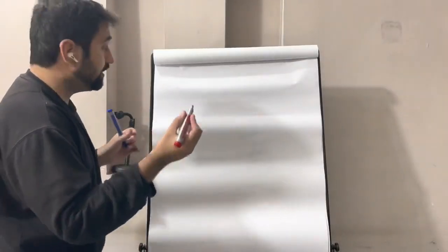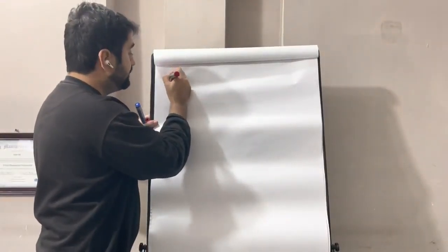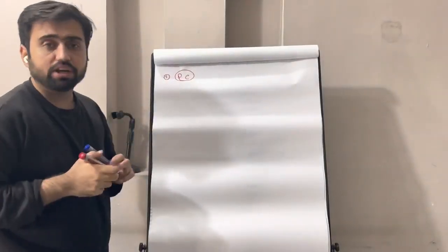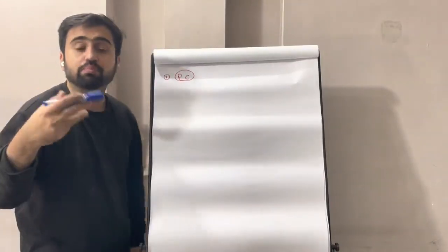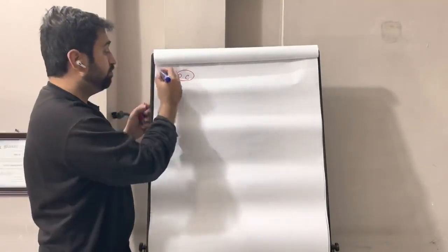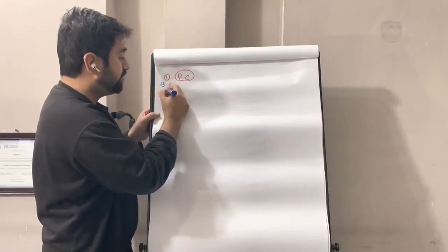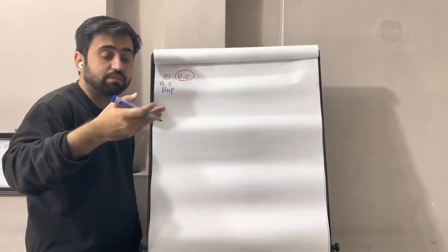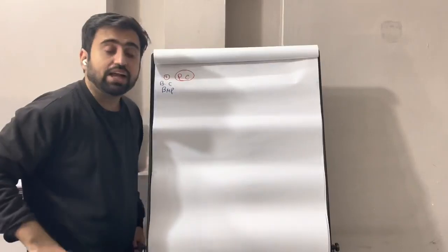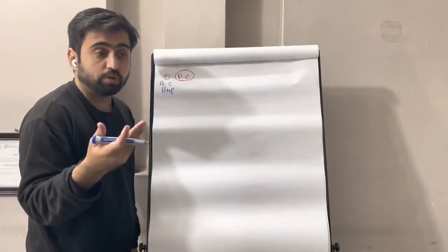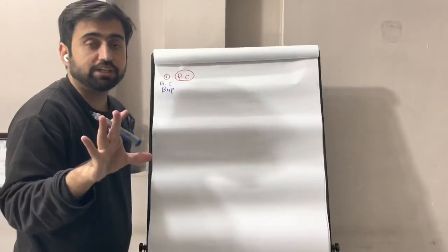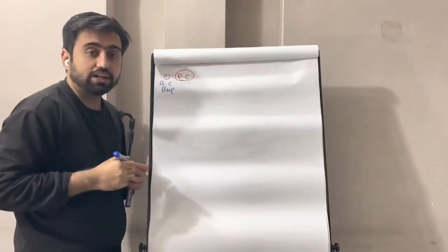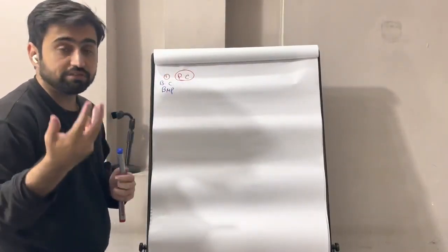The first thing in the journey of PMP is basically you get a project charter at your hand. Now this is an important thing to understand. Whatever has happened before the project charter, we have made the business case, benefit management plan, and before that, need assessment. These things are before the project charter, and although the project manager may be involved, they are not the responsibility of the project manager. The project manager is actually assigned at the project charter area, so his key responsibility starts with the project charter.